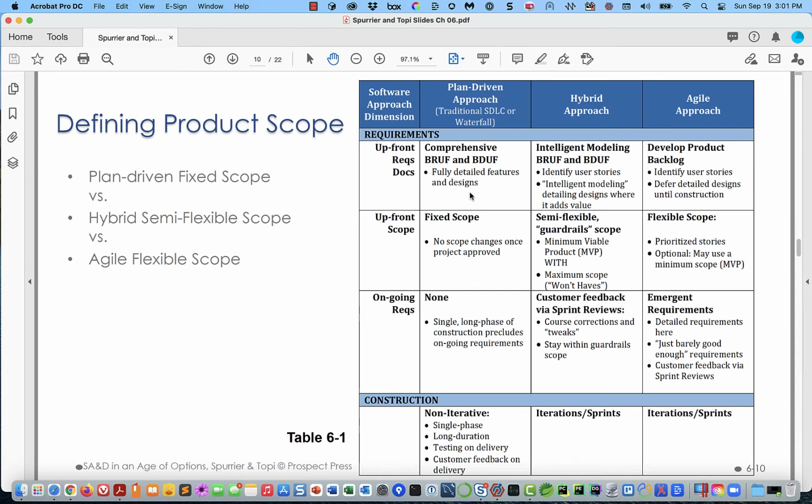Well, they get to see them up here, okay? We actually create a paper model of the system up front, okay? So we actually show people on paper and walk them through, okay, this is how it's going to work. This is what it's going to look like. These are the data that it's going to keep. Do you approve of that? Okay, so users approve and or give feedback to these requirements and designs in detail up front. It's just not the actual software.